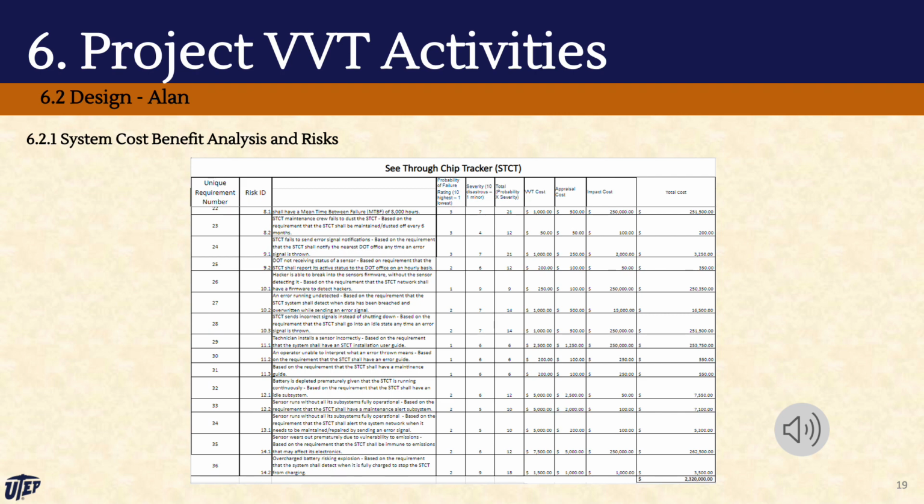You can see that most of our costs for each risk are relatively low. However, we have dedicated large sums over $250,000 to help mitigate all of our most severe risks, which had high severity but moderate probability. For instance, risks 26 and 28, stating the chip could be hacked or it could be giving the wrong signal, could cause an accident on the road, which would be the worst case scenario. Therefore, we saw that these risks were too high for us to accept, and in order to decrease the probability of them occurring, we allocated more money to a mitigation plan for these risks.